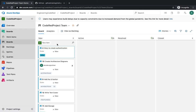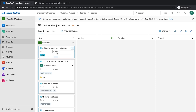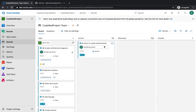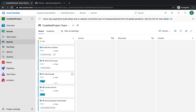If you go to the board section you'll see all your stories are now visible on the board. Boards in Azure DevOps or any agile methodology are a place where you timebox your stories — a story goes through certain stages. When a developer picks up a story and starts working on it, they move it to the active state. You can see the story moves from new to active. Once done, you can move it to resolved.